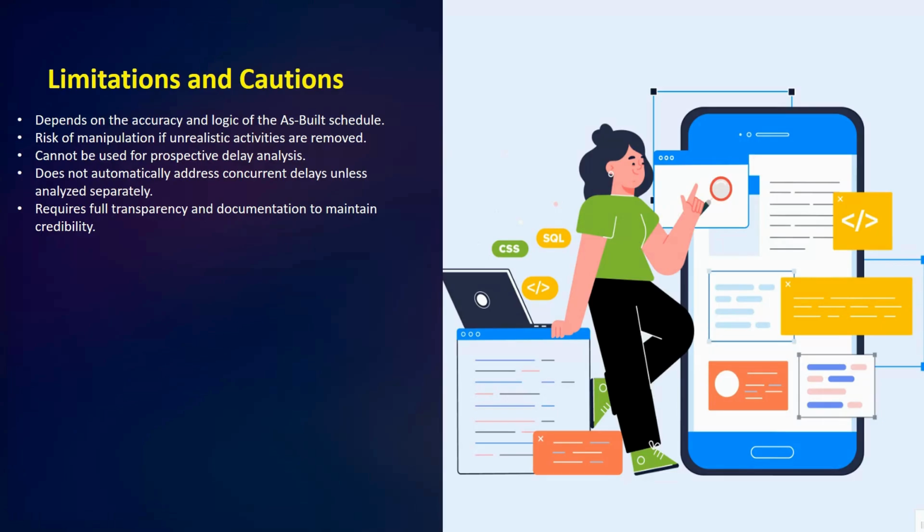If unrealistic activities are removed, the results can become misleading. It cannot be used prospectively and does not automatically consider concurrent delay unless they are analyzed separately.